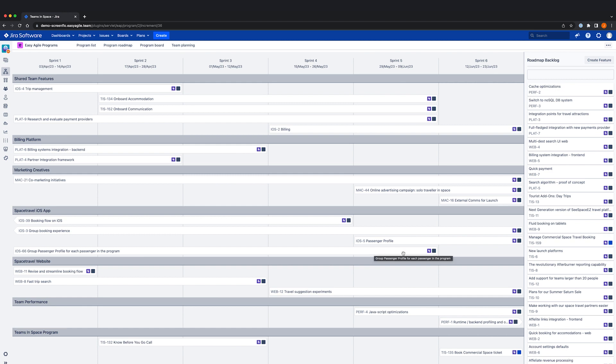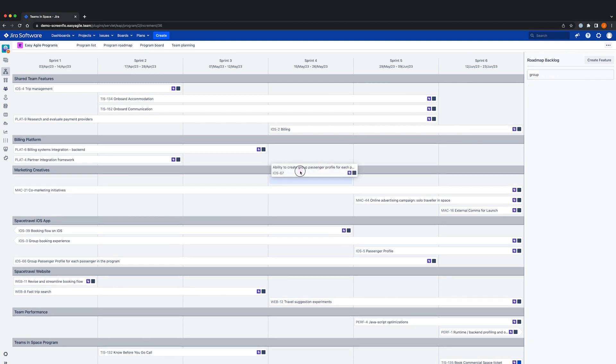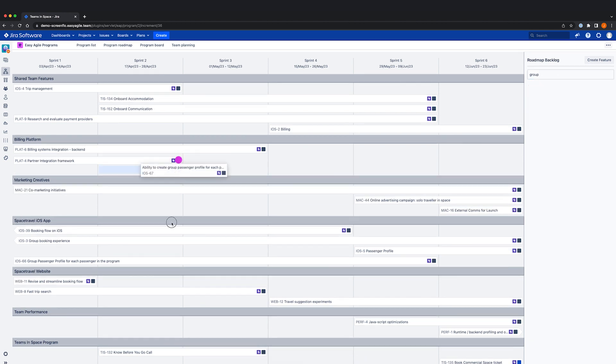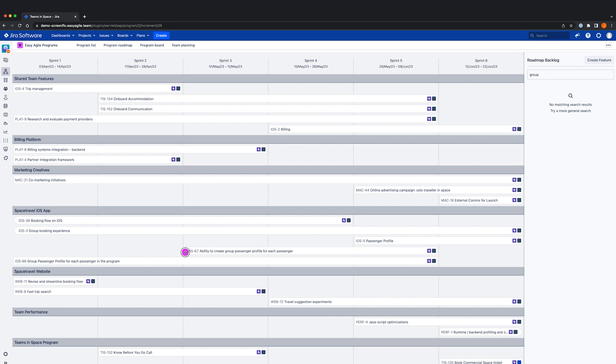You also have the option to search for an existing feature. To schedule work into a PI, you can simply drag and drop the feature into relevant team swim lanes or the shared team features swim lane. Changing the length of the feature will change the start and end date according to which sprint you'd like to schedule.